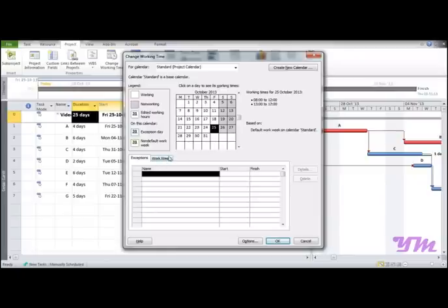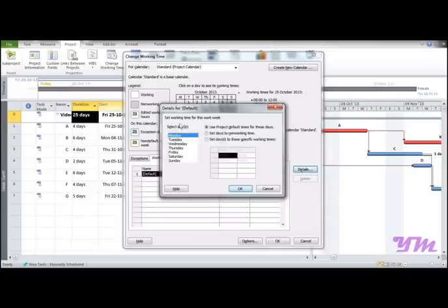first of all we need to go over here to the work week tab, click on it. It's by default written over here. Go to details and select days. Suppose we want to make all 7 days working, we can select all of them, or if we wanted to make just 6, we can select 6 of them. But in this case we are selecting all the days as we want to make all of them working, and then go on to set days to specific working times, that is, we are setting a specific working time for each of these days.